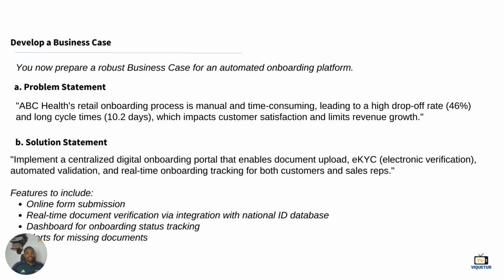First part of your business case is a problem statement. Very concise, straight to the point, and tells the story. ABC Health's retail onboarding process is manual and time consuming, leading to a high drop-off rate and a long cycle time, which impacts customer satisfaction and limits revenue growth. Everybody can see that that is a problem already.